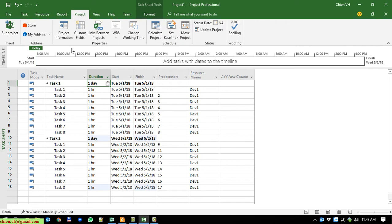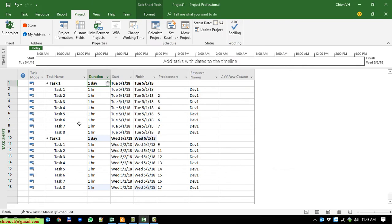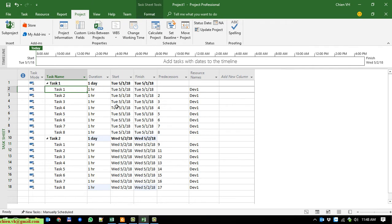You click on Project and then click on Project Information. You can set the start date for this project — today is the first of May, so I will keep it by default. Because I already entered 1 hour for each of the 8 sub-tasks in Task 1, so we have 8 tasks, which means we will do it in 8 hours for Task 1.